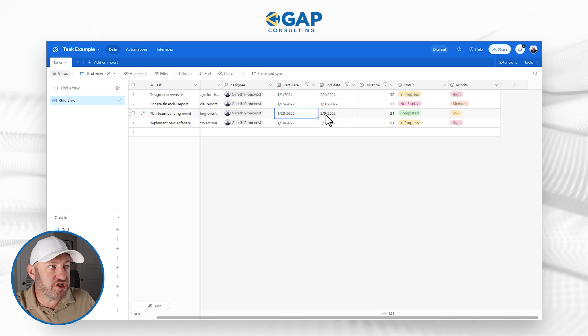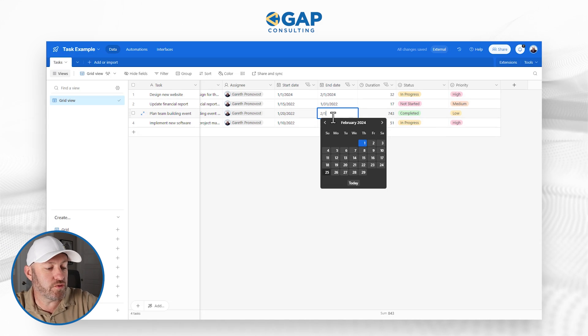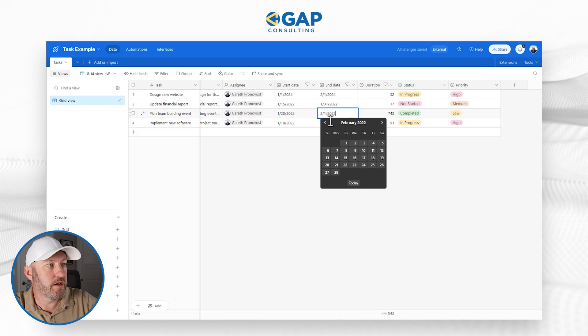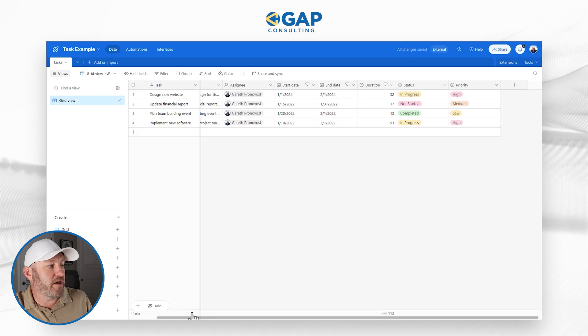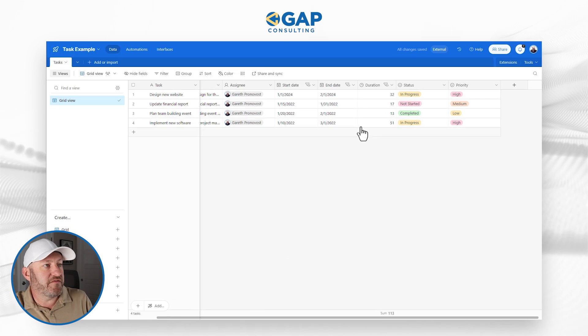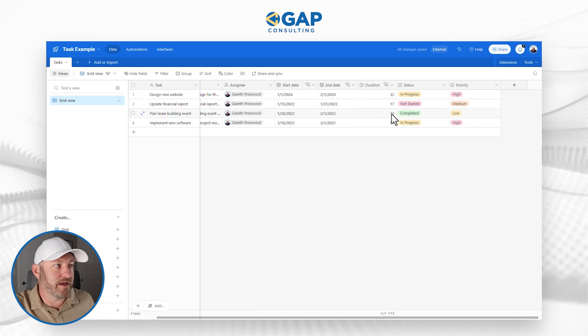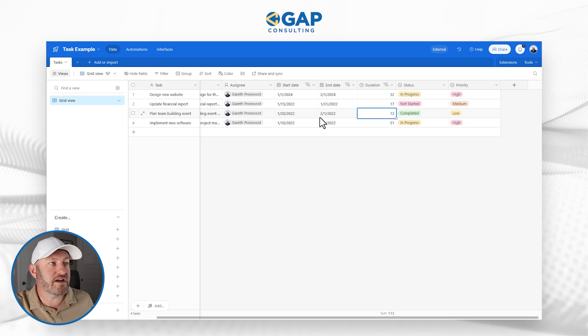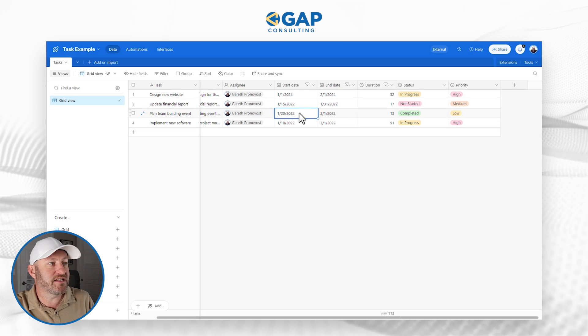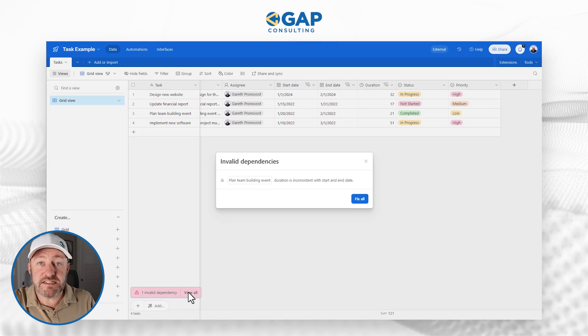But this kind of thing applies throughout all of my dates. If I make a change to any one of these three fields, it will be reflected in the other fields. If I cut this down, and I say, this is only a 21 day duration, well, then it's going to reduce the end date to be 21 days after the start date. If I change the end date, let's say I say 2022. When I make that change, well, then we have this reverse calculation happening where it says, Oh, well, then I need to subtract 13 days and rewind us.